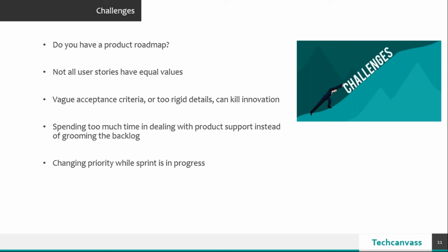The edge cases, which as a product owner I know will not be used that frequently, or probably will not occur that much, probably once in 100 it might occur, you can park them aside. Of course you will do it, once you have gone live with the system, you can have your backlog grooming sessions, prioritize it and pick it up when the team has bandwidth.